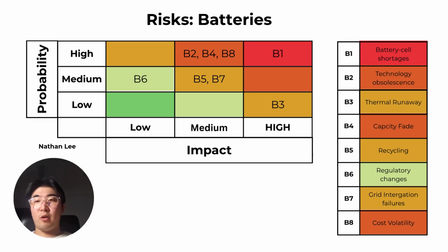Another major risk involves battery degradation over time. Lithium-ion batteries experience a gradual decline in storage capacity with repeated charge-discharge cycles, reducing their effectiveness and economic value over their lifespan. This degradation leads to performance losses, more frequent maintenance or module replacements, and potentially reduced revenue from energy arbitrage. In addition, battery systems have a comparatively short operational lifespan, typically around 10 to 15 years, significantly shorter than pumped hydro or other long-term infrastructure options, which increases lifecycle costs.